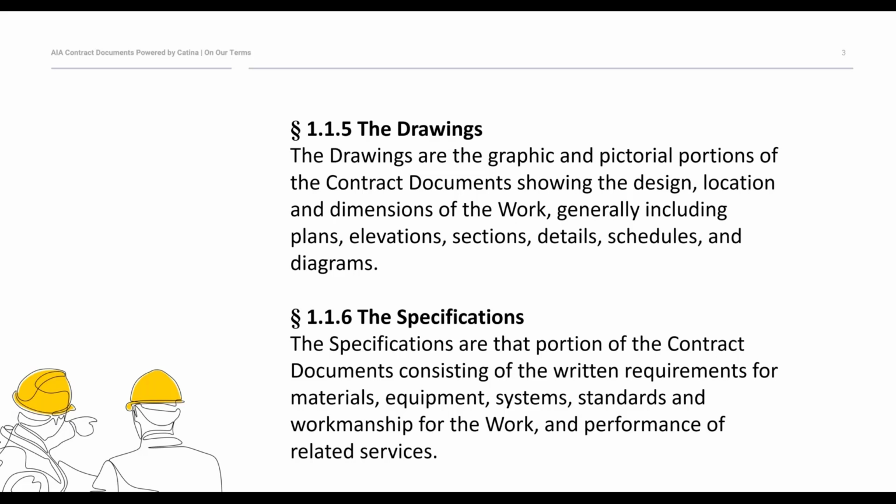It's now common practice in the industry to organize specifications according to the divisions of MasterFormat, which is a publication of the Construction Specifications Institute. Each division is further organized into a collection of custom sections, which describe the general scope, products to be used, and execution of the particular item of work. A library of master specification sections known as MasterSpec, a product of AIA, is currently published and available on an annual subscription basis.